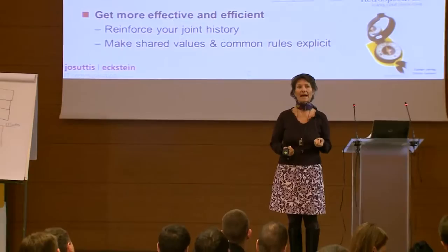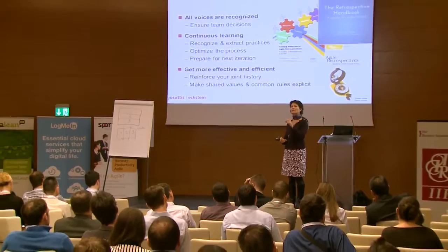And actually, now that I just went to Ed's talk before this one, this reminded me of something that I forgot, which is not on the slide. A colleague of mine who wrote a book on retrospectives, published it last year, added something to retrospectives which I find really important. Whenever you do your action planning, come up with a hypothesis and say, with this hypothesis, what kind of change do you expect from this action?